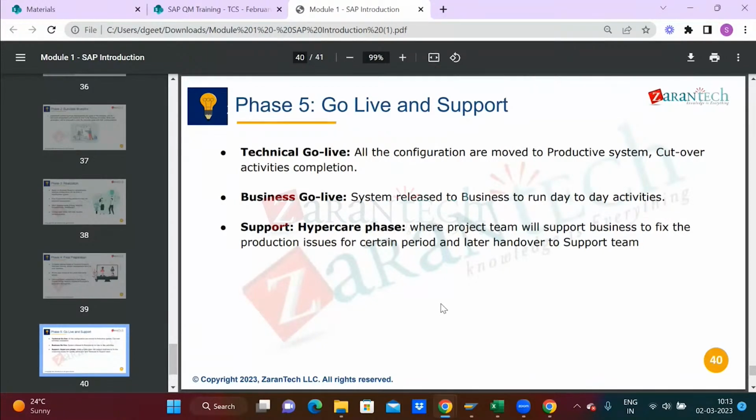Then they will create sprint 1, sprint 2, sprint 3. Over 6 months, they will plan, for example, 20 days for each sprint. Sprint 1, these are the forms to be developed; sprint 2, these are the forms to be developed; sprint 3, the same, with testing and everything.